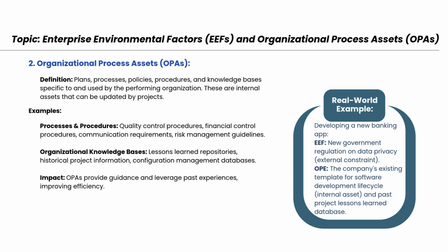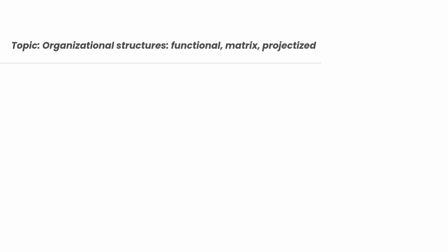Real-world example on the slide. If you're developing a new banking app, EEF could be a new government rule on data privacy, an external constraint. OPA could be your organization's internal template for software development and a lessons learned database from earlier projects.